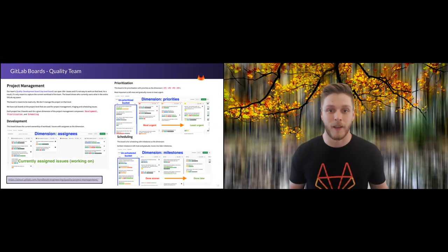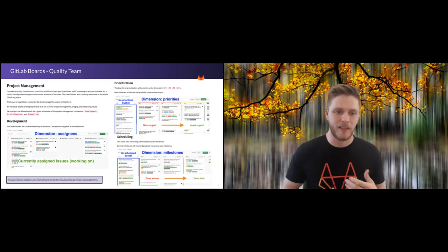So you can directly create lists of issues for individual users so that you can see which team members have a lot of work on for the current sprint. So in that way, you have your scheduling of the work and then your scheduling of the people. And then once you've gotten past the planning stage of the work and you're actually starting to do the work, you can use labels like we discussed earlier to create individual lists of issues that contain that label.